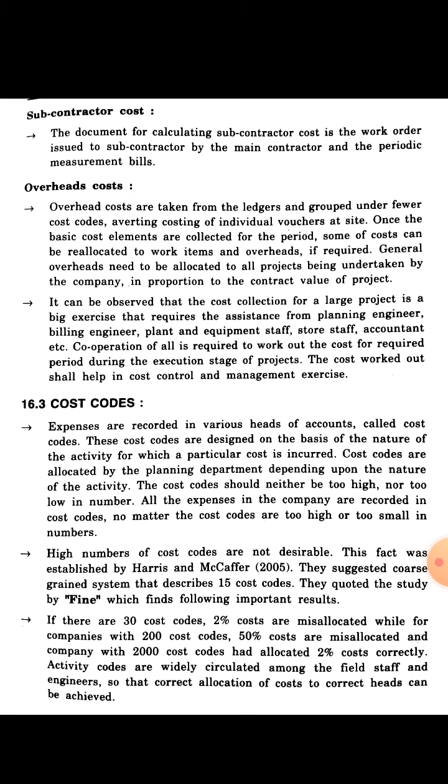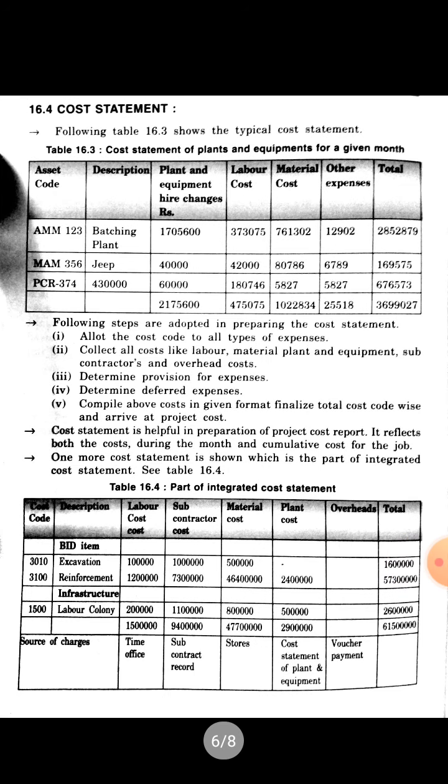Another topic is the cost statement. A cost statement table for plant and equipment for a given month is presented. There are seven main columns: asset code, description, plant and equipment hire charges, labor cost, material cost, other expenses, and a total column which is the summation of all plant and equipment hire charges, labor cost, material cost, and other expenses.